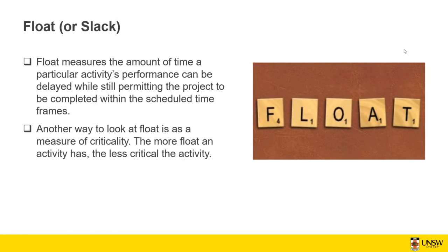Another way to look at float is as a measure of criticality. So the more float an activity has, the less critical the activity, which means that this particular activity or task can be completed or started at floating time. So it doesn't affect the project duration that much.